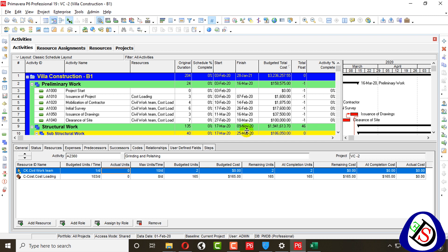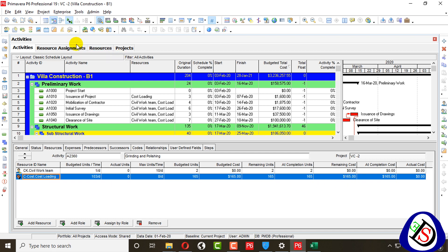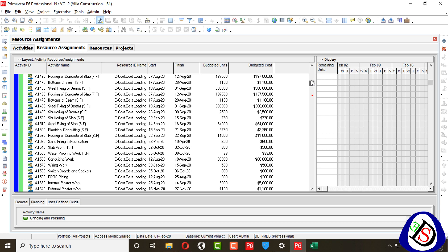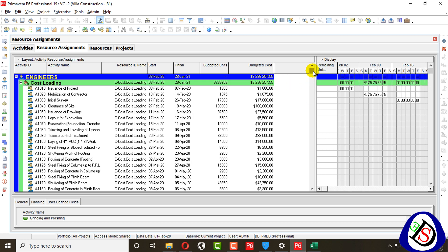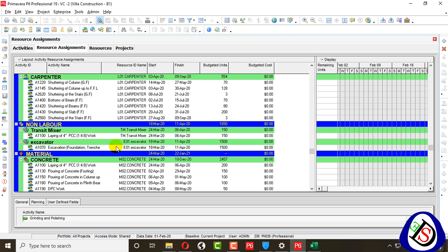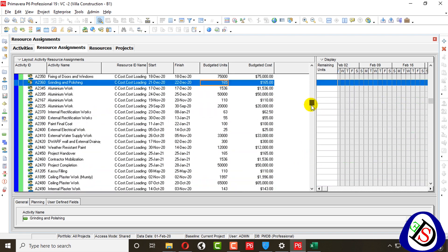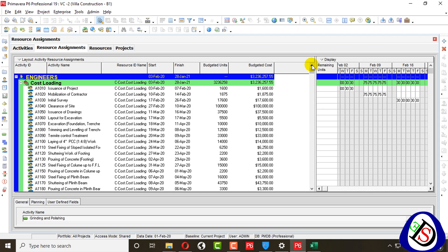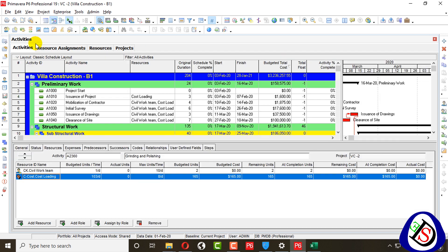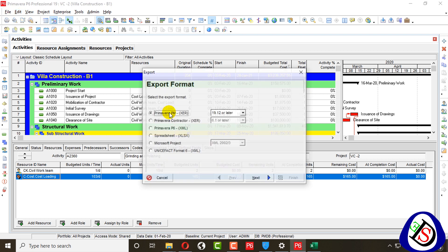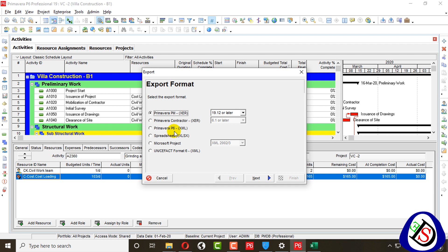That is how to load cost into the project. If I remove the filter, you can see the cost loading resource contains all the loaded cost — 3.2 million. The cost loading resource holds only cost based on the BOQ values. Other resources like non-labor and material have units but no cost assigned to them — only this cost loading resource holds the total project cost. This was today's content: how to import and export files and how to make cost loading through an XLS file.